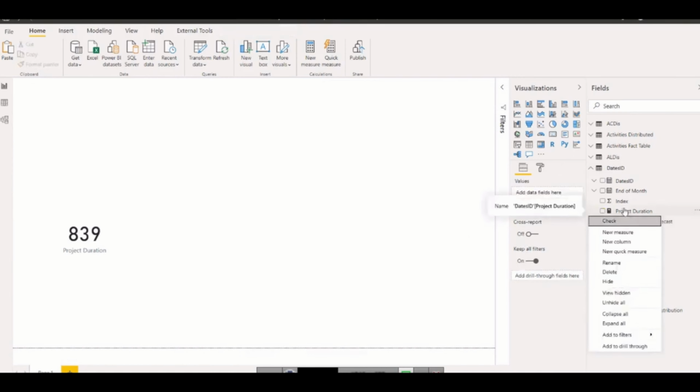So now I'm going to calculate the project elapsed duration based on the baseline dates. If your case is different, for example, your baseline dates are already gone and you are following the forecasted date. For example, your baseline date was 1st January to be finished and you are here in, let's say, the end of January, and your EOT is not approved and all these things are going on. So definitely if your baseline date is already in the past, you need to use the current dates, or maybe you need to revise the baseline. So it's up to you.